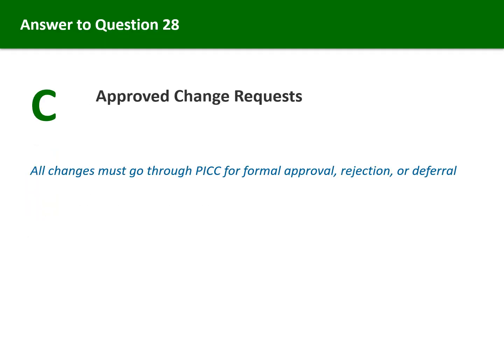Approved Change Requests. Perform Integrated Change Control evaluates all change requests and produces approved, rejected, or deferred decisions. This process ensures that changes are properly assessed for impact across all project dimensions before implementation. Only approved changes should be implemented. This is the governance checkpoint that prevents scope creep and uncontrolled modifications to the project baseline.